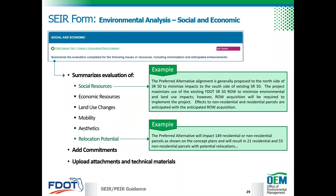In the SWEPT-based SEER form, there is a page for each of the environmental resources divided up by sub-resource. For the social and economic section, you will see subsections for each resource listed. The form allows you to check whether any of the resources are enhanced or whether they will have a substantial impact or not. A brief summary is provided for each resource, commitments can be added, and technical materials and attachments can be uploaded.